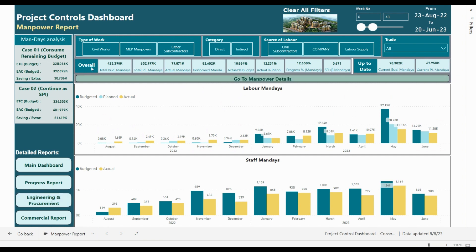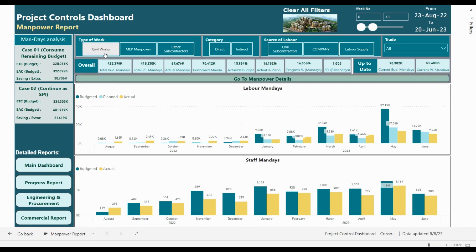For the manpower analysis we have an important breakdown: budgeted mandays, total planned mandays, actual mandays, performed work mandays, the actual percent of budget, and the actual percent of planned. We have full detailed analysis of progress in mandays. On the left side there are two scenarios for the expected-to-complete and expected-at-completion, so you can analyze whether you have a saving or will use extra manpower beyond the budget.